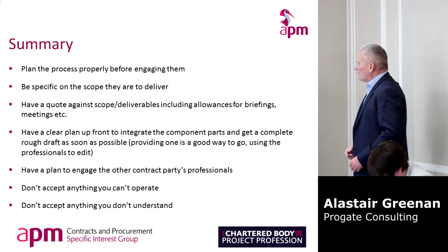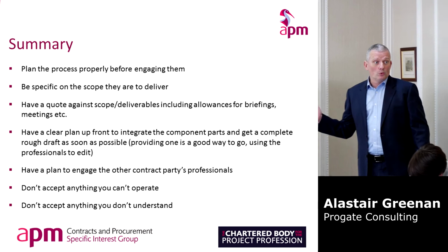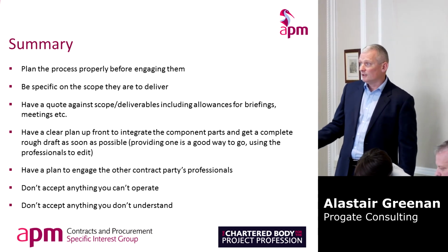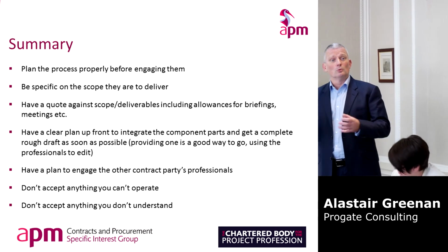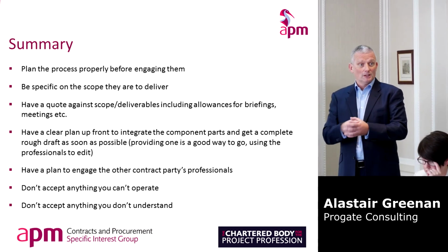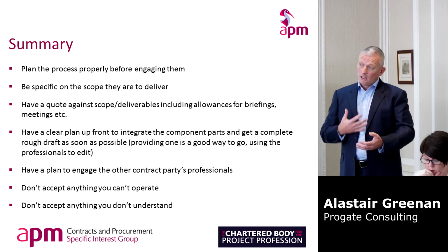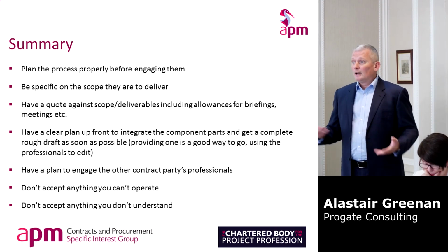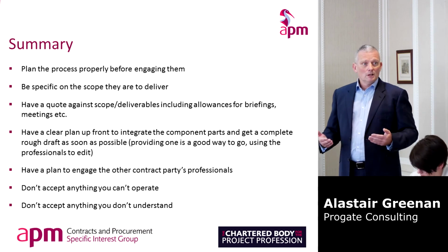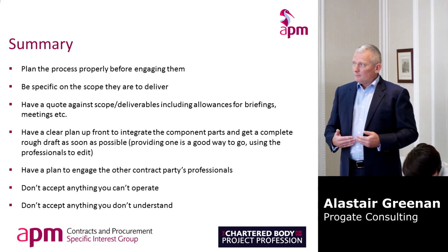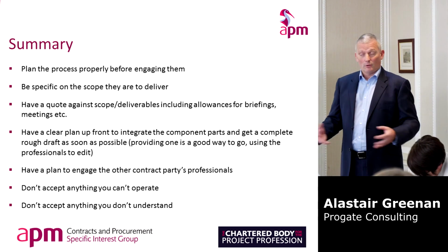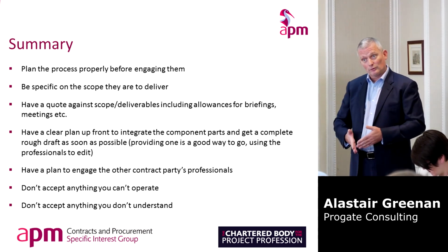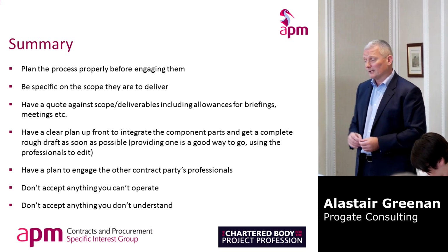Have a plan to engage with the market, the contractors, whoever it is. What I did with the 69 was I got them to work through a single point, a negotiator on their collective behalf. So we worked together, and then they went back behind closed doors to have their own conversation, because you can't engage all the time with the 69. So I met with all of the 69, and we all agreed that they would funnel their comments through a point source, which made it manageable.